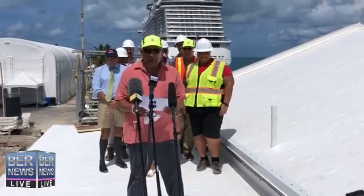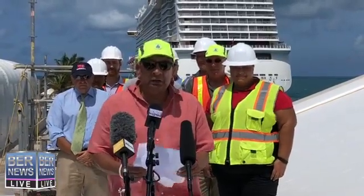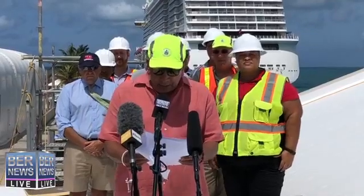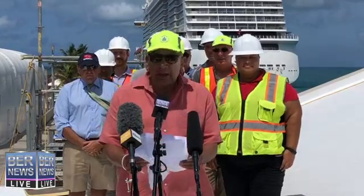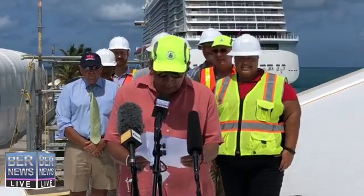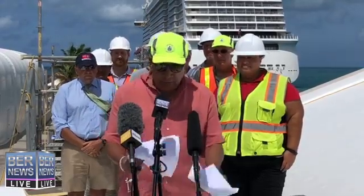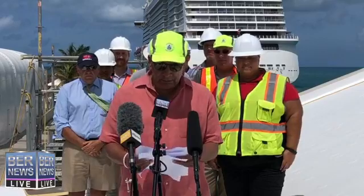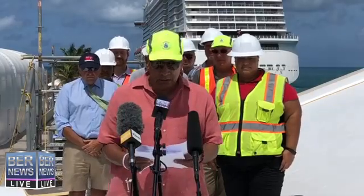It was November 17th, 2018, that we began the demolition of the previous terminal and the entire dock. Following a comprehensive inspection in 2014, deck problems were clearly identified, and the report at that time estimated a replacement cost of the deck and terminal building at more than $20 million. It was clear that the deck had deteriorated and needed to be rebuilt during the 2018 off-season, which ran from November 15th, 2018 to April 9th, 2019.